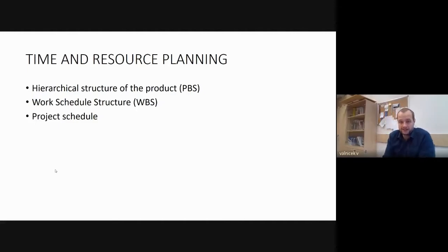That's the overall product, but we need to decompose this product into smaller pieces, which we are able to describe. Because if you came to the market, let's say to Bauhaus, you cannot say, give me the material for one house. So you need to decompose the product into smaller pieces, which can be described in terms of, let's say, activities.